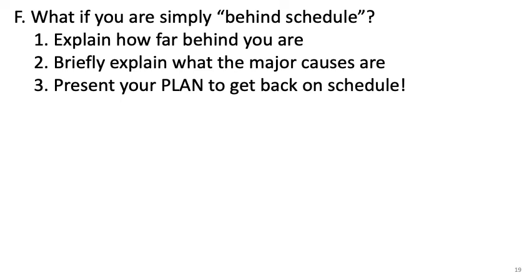So as I mentioned in the previous examples, you may have to accelerate the project by hiring more workers. Also doing more shifts per day instead of one. You do 2 shifts per day, and with that you can improve the production rate, and you can shorten the project duration, and you can avoid project delay.